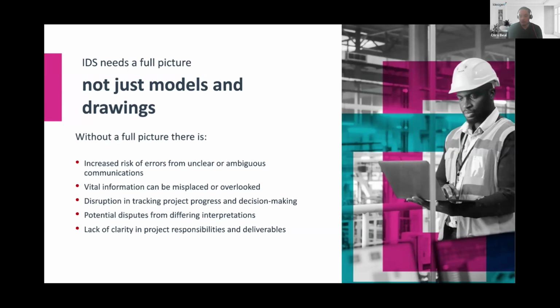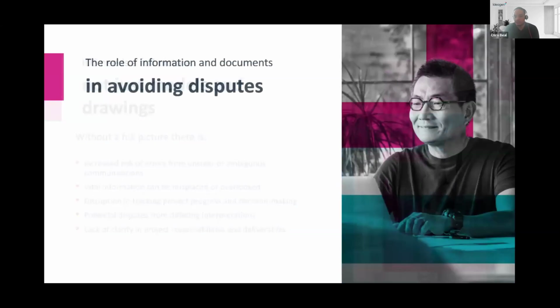So, what does good look like? Emails filed automatically against the right project, metadata that is applied so you can search by topic, contract package, or even decision type, a full audit trail of who agreed on what and when, and retention policies that ensure you're meeting legal and safety obligations. So it's not about being perfect, but it's about being consistent, traceable, and prepared.